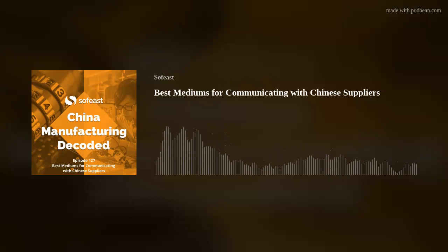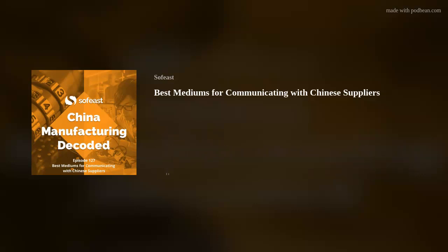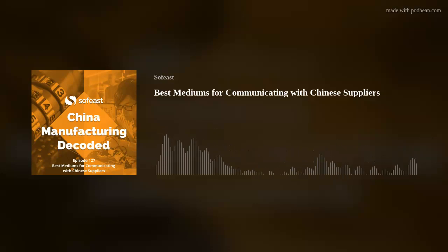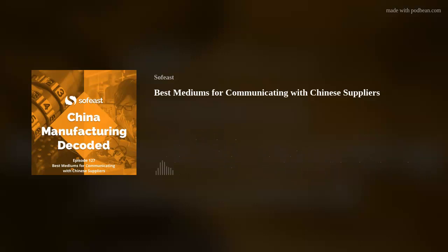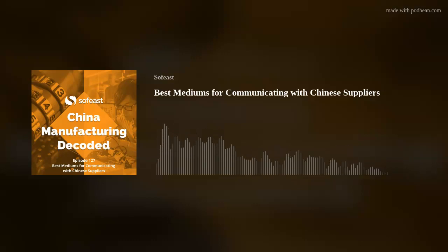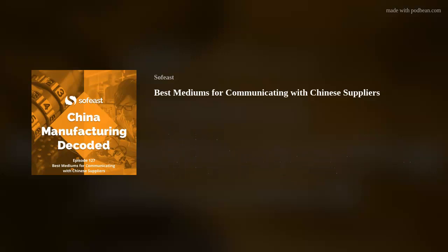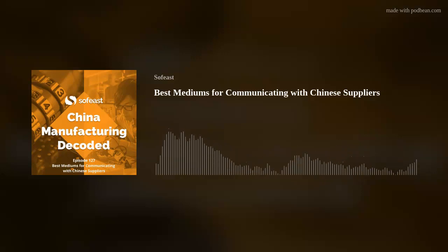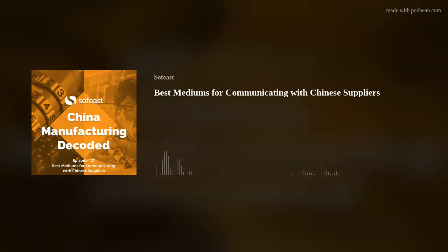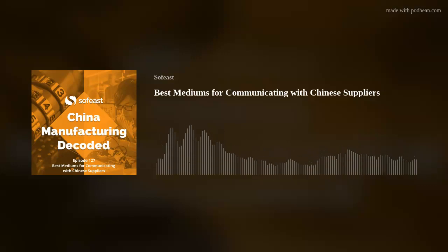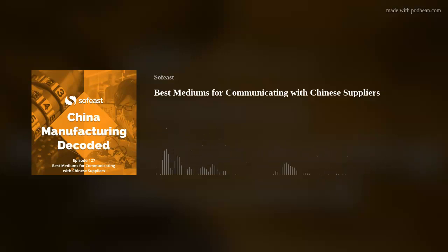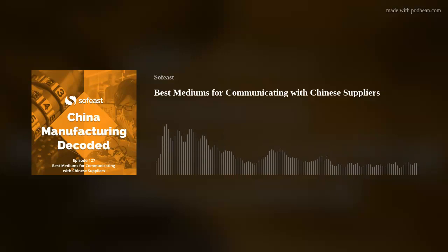And I picked the bill of material. It could be the ownership of the tooling. It could be all kinds of things. What happens if there's 5% defective goods in a batch? What happens if this and this and that, right? If you don't get that confirmed in writing early on, the longer you wait, the harder it will be. And then if you wait until you have some kind of disaster with a supplier to actually look into it, well, what do you do, right?